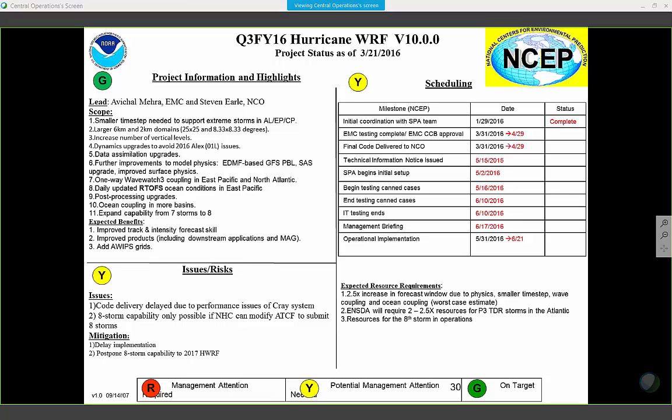So when we say it's a victim of the Cray, is it the way the code's constructed to get the appropriate performance? No, not at all. We were having an issue on the Crays where we couldn't schedule jobs. They would go into some weird unknown state. The system was actually very confused about whether nodes were available or not. So it wasn't really anything particular to the H-Wharf at all. It was just they were pretty much the only ones using the system. Okay, so they were the ones that managed to get on day one because of the original planning, and we planned for them to be very aggressive getting on that machine. Totally understand.